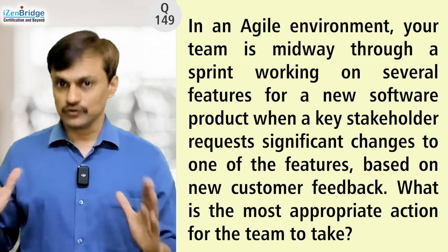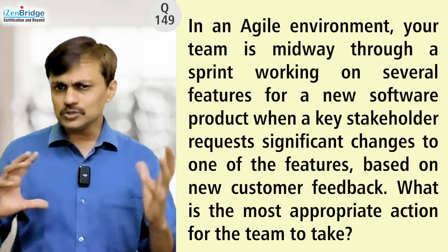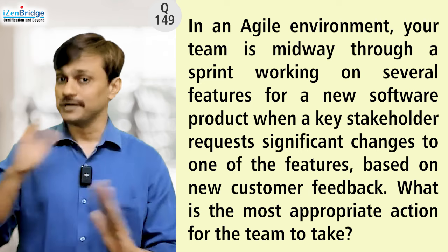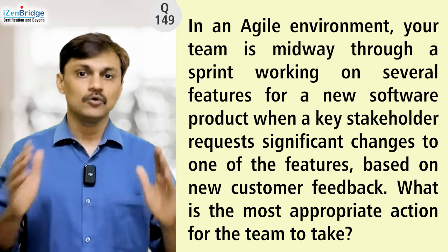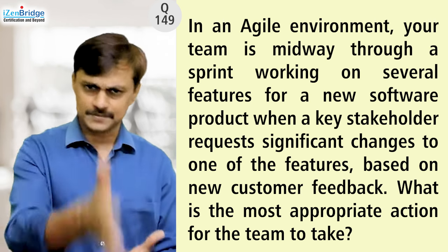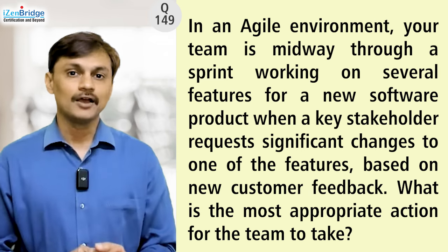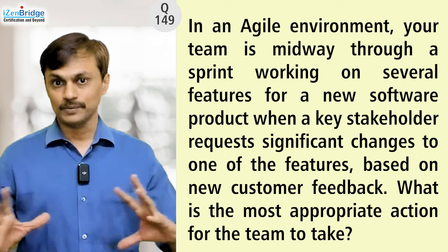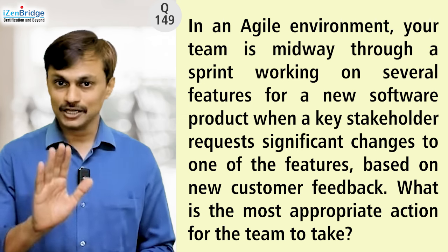And in the time-boxed Agile ways of working, it is recommended not to make too many drastic changes when you start the sprint. You had better do it on sprint boundaries. You should not be changing your goal, your direction once you start the sprint until it gets over, or unless you face some exceptional situation. Sometimes you just restart the sprint. So it is a little tricky: we want to respond, but we don't just right away start responding to it. So we need to see the options carefully.